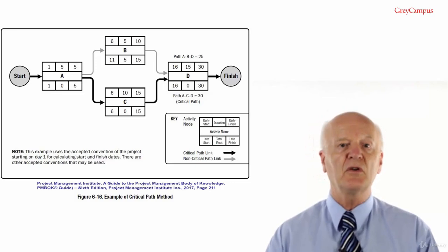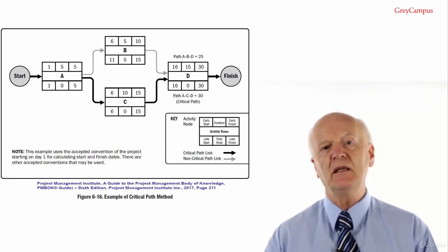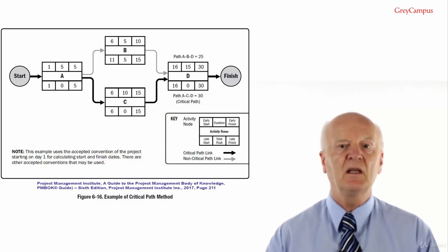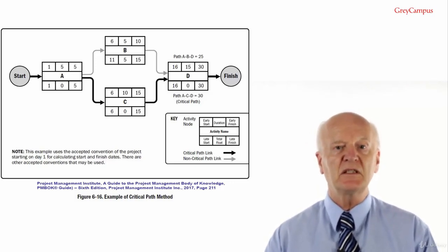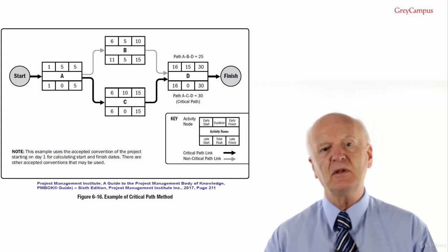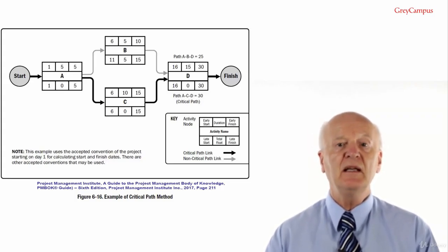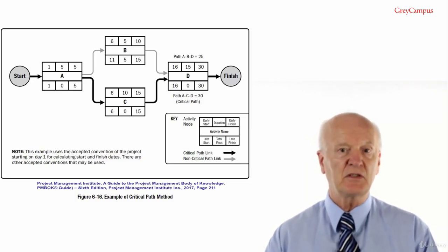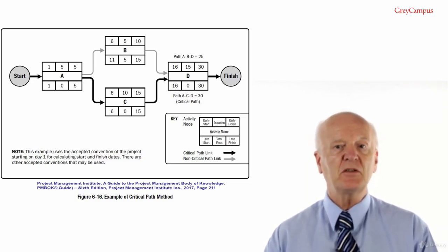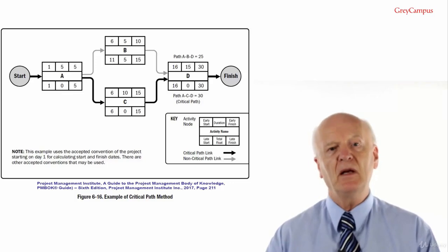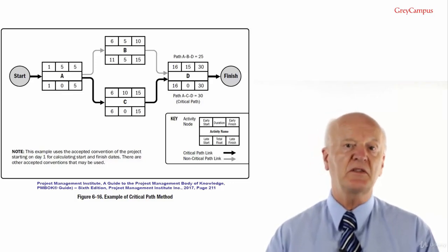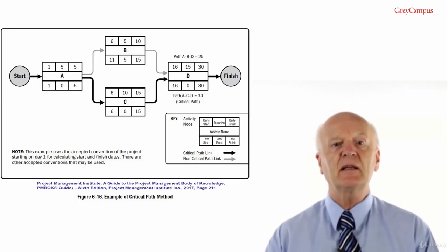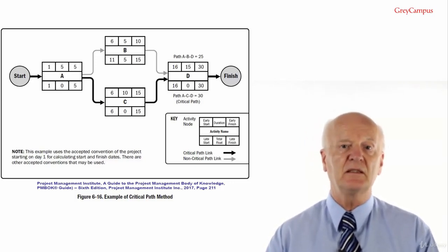Negative total float is caused when the constraint on the late dates is violated by duration and logic. Negative float analysis is a technique that helps to find possible accelerated ways of bringing a delayed schedule back on track. These are all important definitions for the examination. Schedule networks may have multiple near-critical paths. A near-critical path is a path that could become critical if an activity on the critical path is delayed.